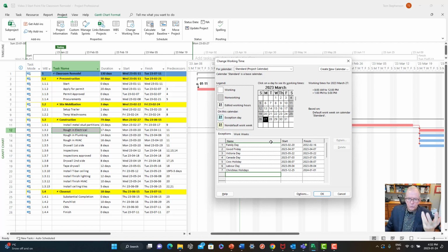There's times where you do work, especially when we get into the updating process. Maybe you decide to get time back. You're going to work a few Saturdays, or maybe quite a few Saturdays, or maybe all the Saturdays, right? So it depends what your schedule is, and we'll talk about that as we go. But let's just say we want March 11th, 18th, and 25th.